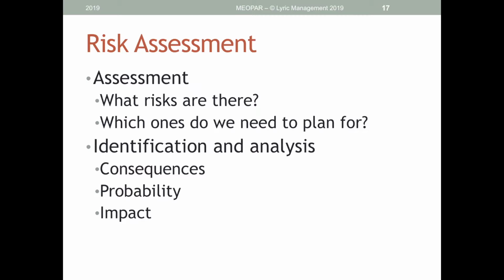What is the probability that this is going to happen? Each project would need to identify this on their own, but generally, if you have a PI who's applying for funding to do a specific project and they have a long-term relationship with their collaborators and with their institution, and they're of a vintage where it's not likely that they're going to be retiring during the course of the project, then the probability of that kind of change happening is actually quite low.